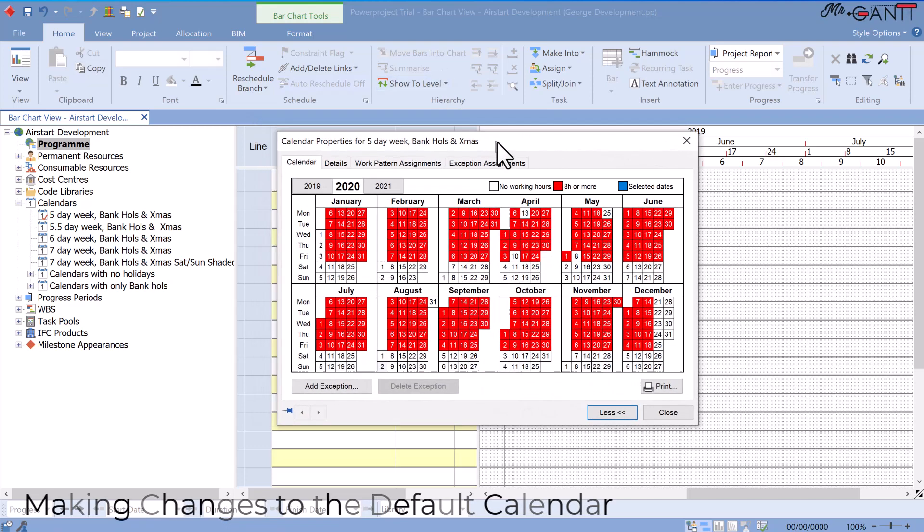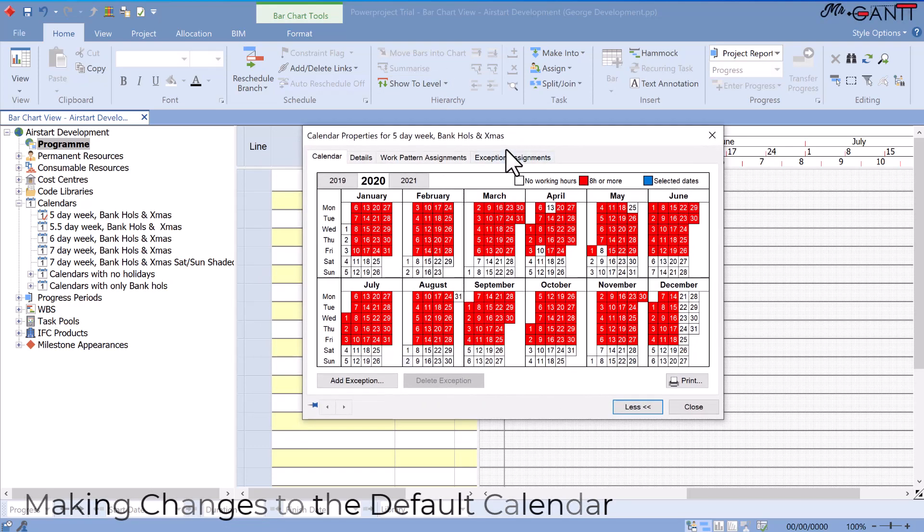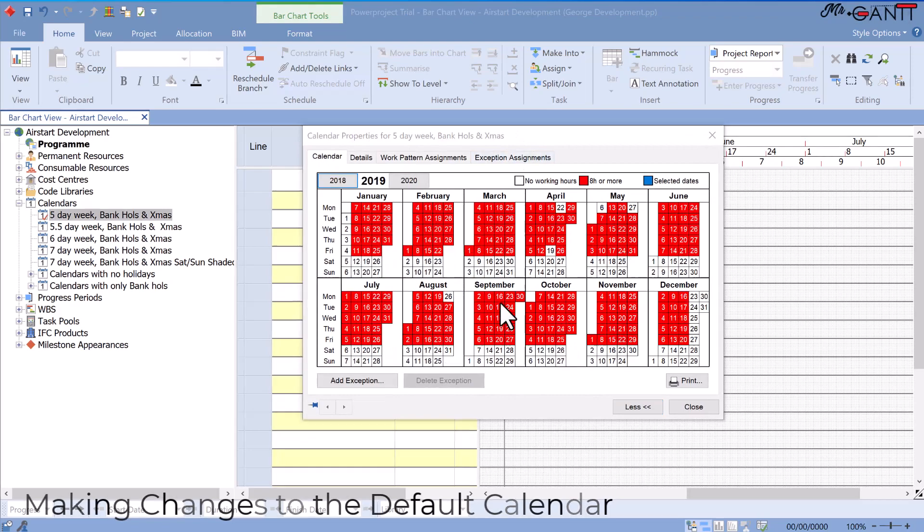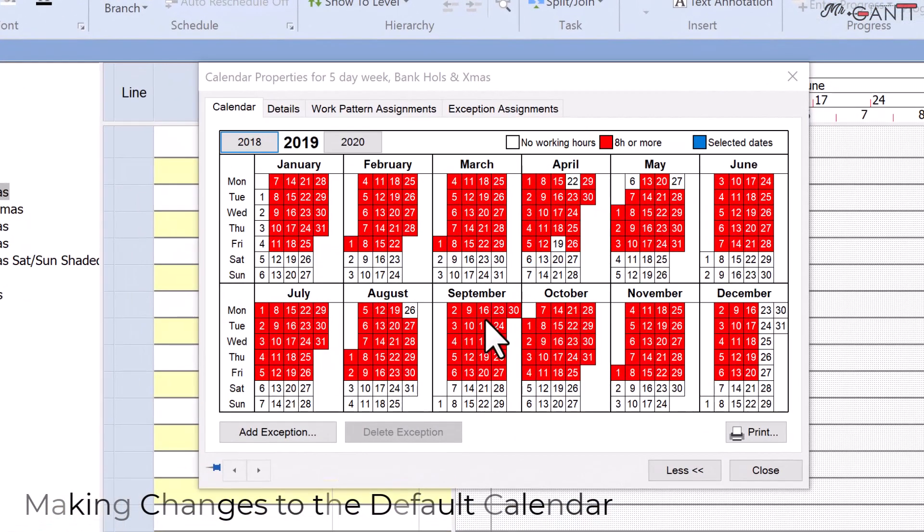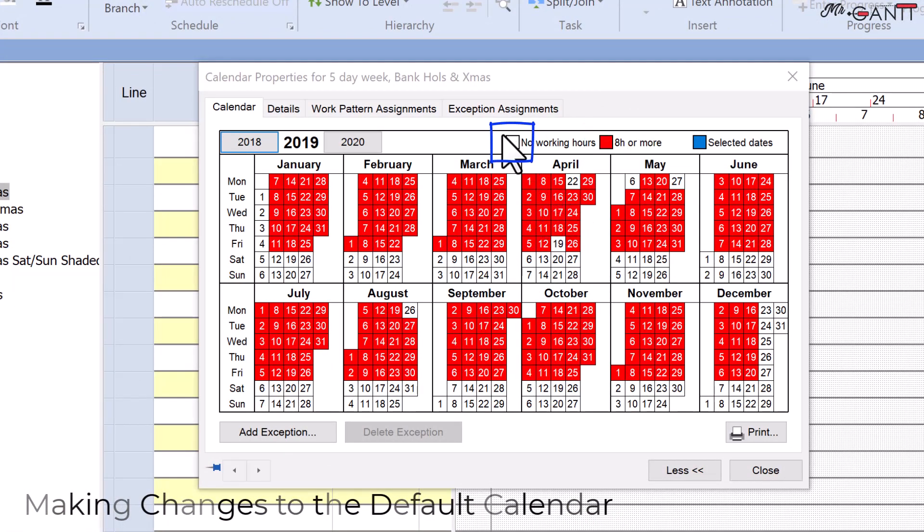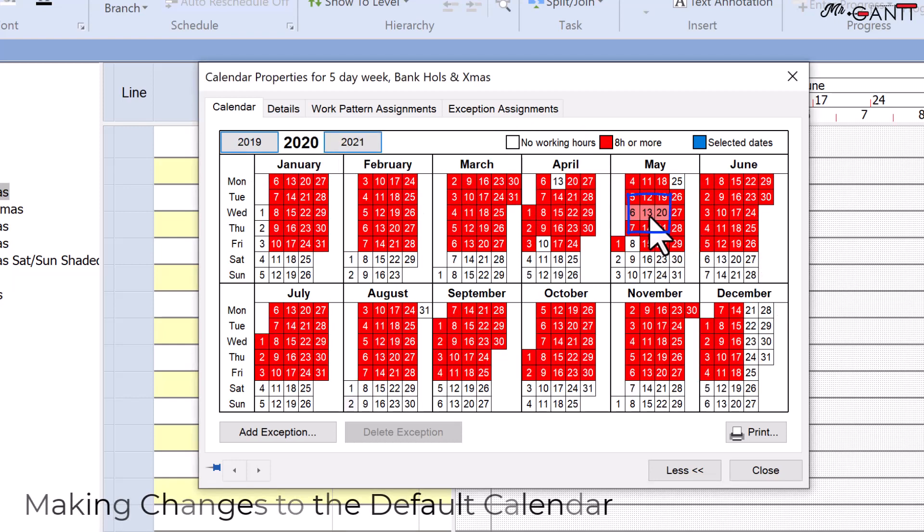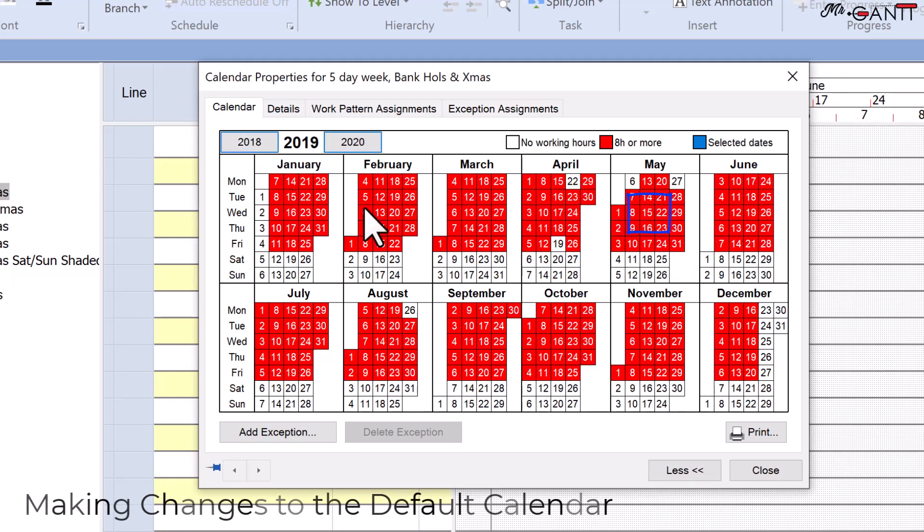The calendar tab of the calendar properties dialog appears. If a day is colored red, by default, it contains working hours according to the calendar's work pattern. If a day is colored white, it contains no working time. Days in pink have one or more exceptions that lower the working time for the day.